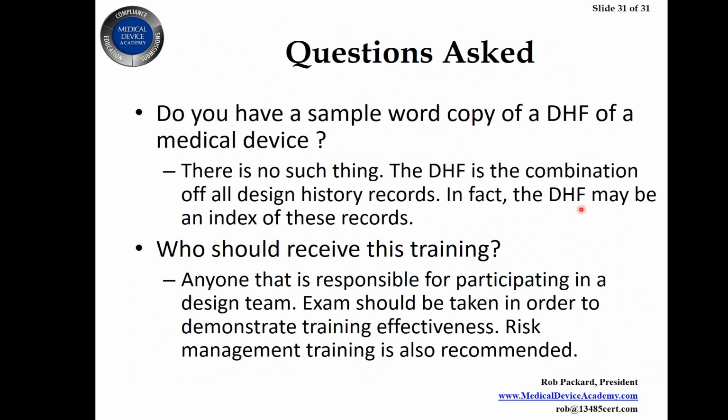And if you have a class 1 product versus a class 3 product, those DHFs are going to look really different as well. So in general, I recommend that you have a template for your design plan, and it's not that you shall have all the elements in your design plan. It's more of a, here's the recommended content for a design plan, but you can modify it for the specific product. And you might even give some hints in your procedure saying, for instance, if it's a minor device modification, you might have fewer reviews and only have 1 review at the end. You might not change your design inputs at all and might keep the design inputs exactly the same as the previous version of the device.